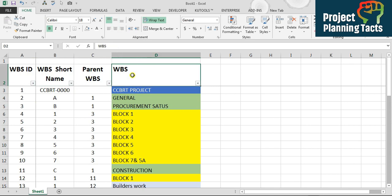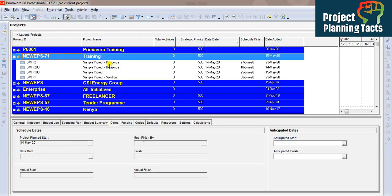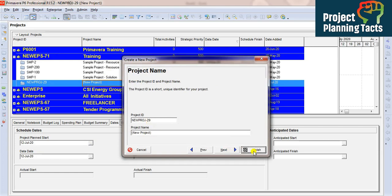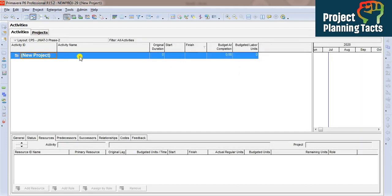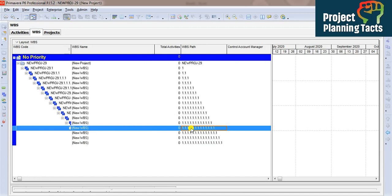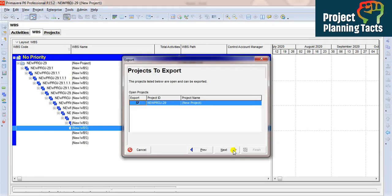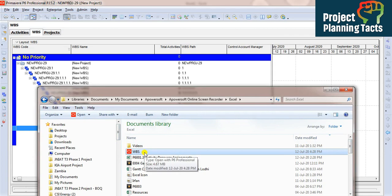We created four columns — WBS ID, WBS short name, parent WBS, and WBS name — because these four columns are what I will fill into the Primavera XCR file when I open it in Notepad. Now, in my database I will add a project under Training. I've created the project, which shows as 'New Project' with a default project ID. I'll open it, then create a random WBS, export it, and save it as 'WBS Finish' — that's my WBS XCR file.